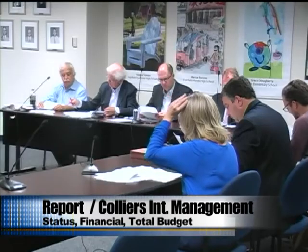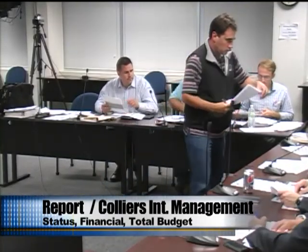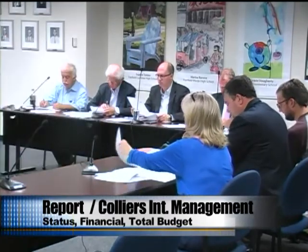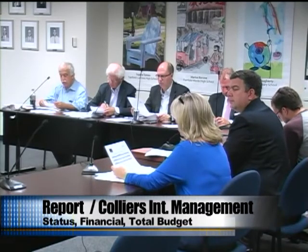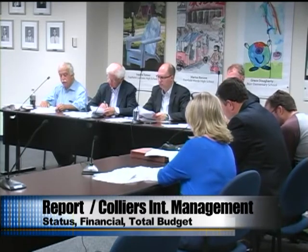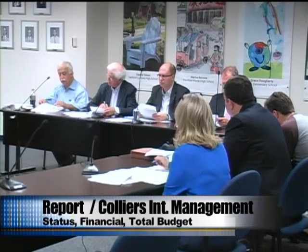What's the status of the CM's construction contingency? Hasn't changed since the last meeting. So I look forward to questions from the committee, but it appears that the construction contingency is 260,000? Yes. We started at 270, we have 260 left. Are there things that are drifting into the owner's contingency that ordinarily would be in the construction contingency? This seems to be a number that's high.